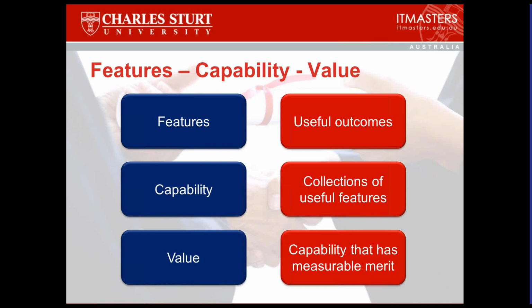Given that there are very few other roles involved, as a team member you'd probably address this with the Scrum Master, saying that we're seeing challenges with interpretation because we're not convinced that the specificity being ordained by the product owner is in agreement with the feedback we're getting from the customer. The Scrum Master can make sure that the full extent of customer feedback comes back to the team and is available to the team. It's not useful or good for the product owner to be an insulating shield wall between the team and the customer feedback, providing 100% of the interpretation. That's not how it should work.